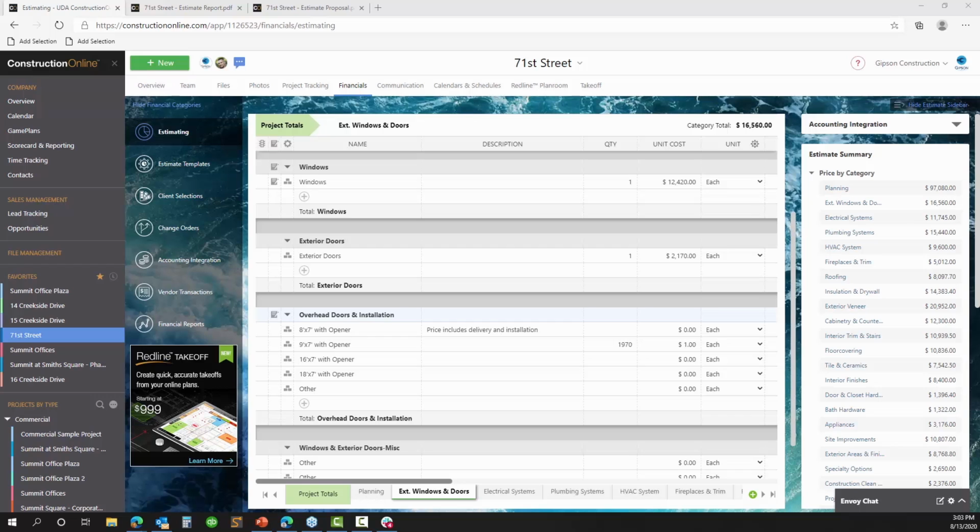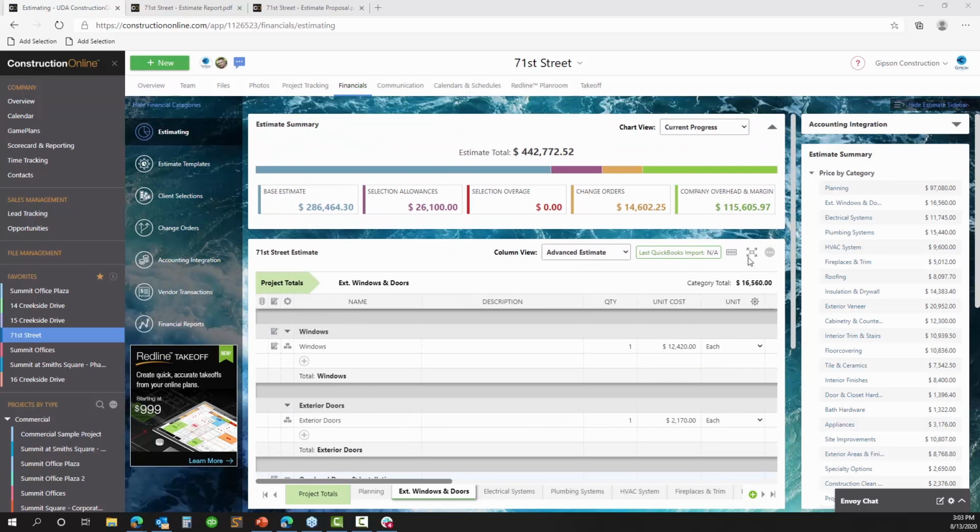There's another question asking about our takeoff function as well, which is sitting right there at the very end of our major feature groups inside the project. You can see where it says takeoff. Our team has been very hard at work tying up the final pieces to connect the redline takeoff functions to the estimate inside of your project, so that you can do all sorts of really interesting things, like taking the square footage for, let's say, some type of floor covering or carpeted area and tying that back into your quantities in the estimate, or vice versa, working through the estimate while you're working through your takeoffs as well.